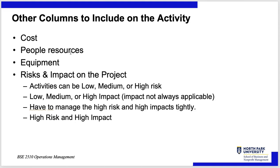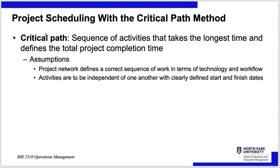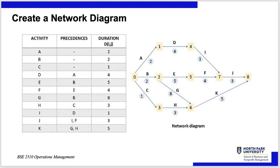We are going to teach the Critical Path Method. We'll use durations, precedents, and a network diagram to find out how long the whole project will take. If I look at this and just add up all the tasks — 5, 10, 14, 18, 26, 30, 38 weeks — that would be wrong, because obviously you can do things simultaneously.